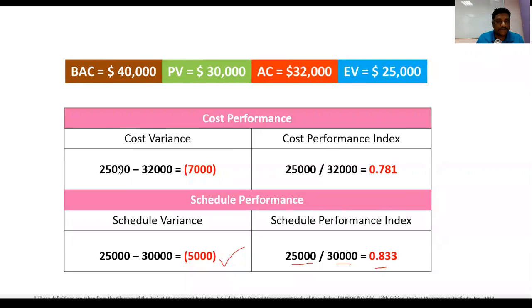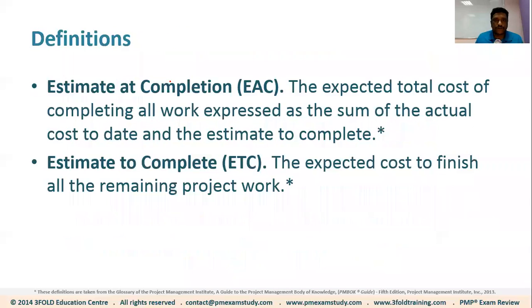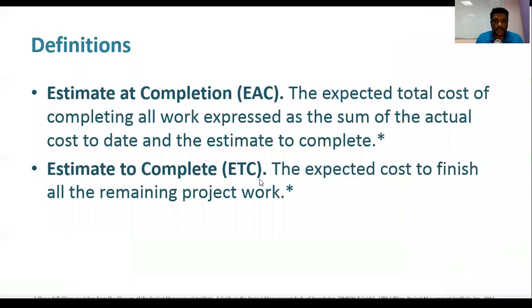Okay, so, well, that's about it. No more questions. All right, now let's move on to forecasting. We are now going to do cost forecasting. Khalid Khan is asking, can we calculate the number of days delay from these parameters? That is what we cannot do and we should not do. How many days you are behind the schedule? Look at the schedule. That's what the schedule is for.